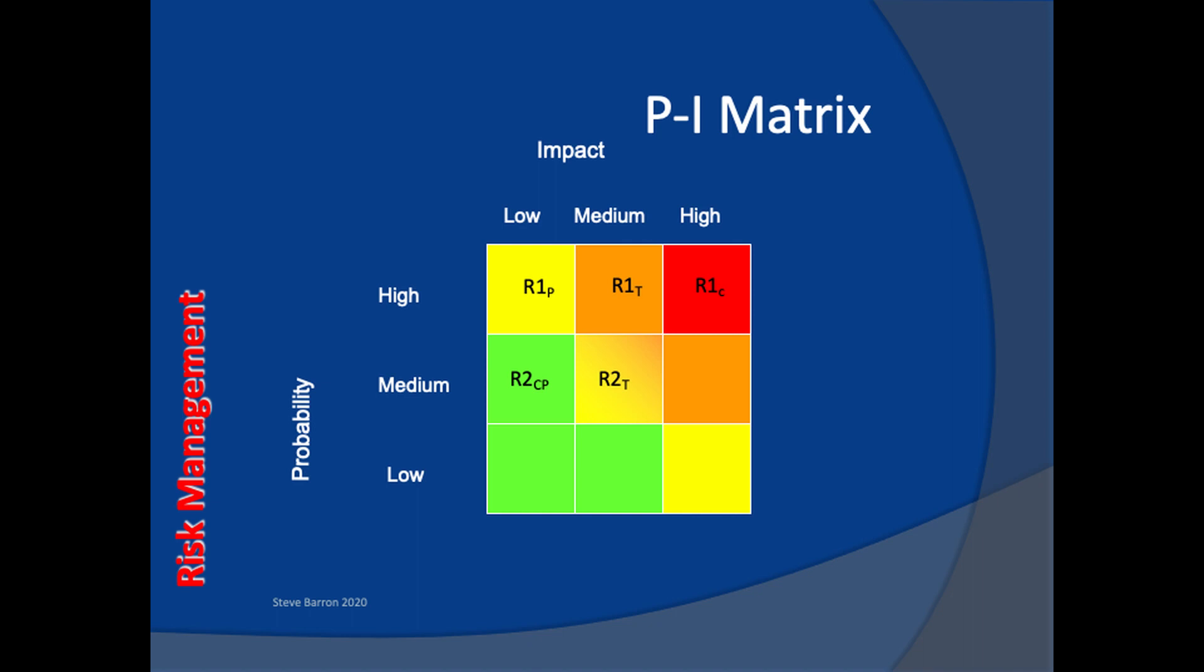For the priority risks, we will actively develop mitigation plans that are designed to reduce risk status, pushing the risk into the lower levels of the matrix. If this is not possible, we will create contingency plans that provide alternative actions that will progress the project if the risk occurs.